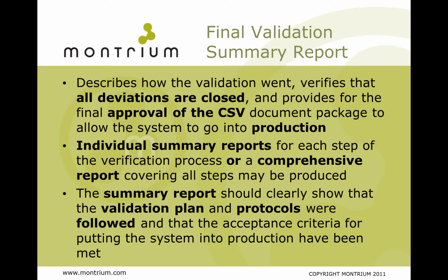And so it's a very important document because it provides us with a very accurate overview of what actually occurred, how the system was validated, who was involved, what deviations occurred, and what's the current state of the system, and can we release it into production. In some instances, we could actually create individual summary reports, but we still need to have a report at the end of the process to say this system now meets its intended use.